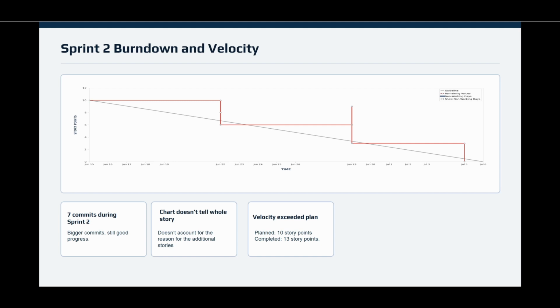Even with the added work, the sprint still resulted in significant progress, and I completed more than the original planned stories while improving the project's overall presentation, test coverage, and readiness for demo needs. Looking at the work completed across the first 2 sprints, the project is in a strong position. I completed 24.5 story points against an expected capacity of 20 points, which shows that the current pace has been higher than originally planned.